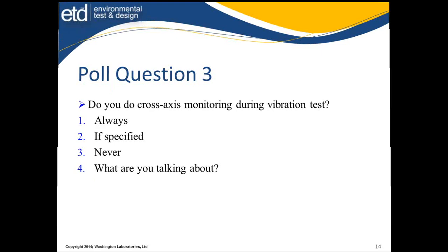Every project that you do should not be a crisis management situation. Customers that do this get to be well known, and the labs just absolutely charge them more because they have to. They have to try to jump through hoops every time, not just occasionally, every project. And why do they do it? Because program managers put on a schedule, and as things slip, they don't allow for it, or they ask for a make-up-for-it mode, and nobody makes the significant changes.